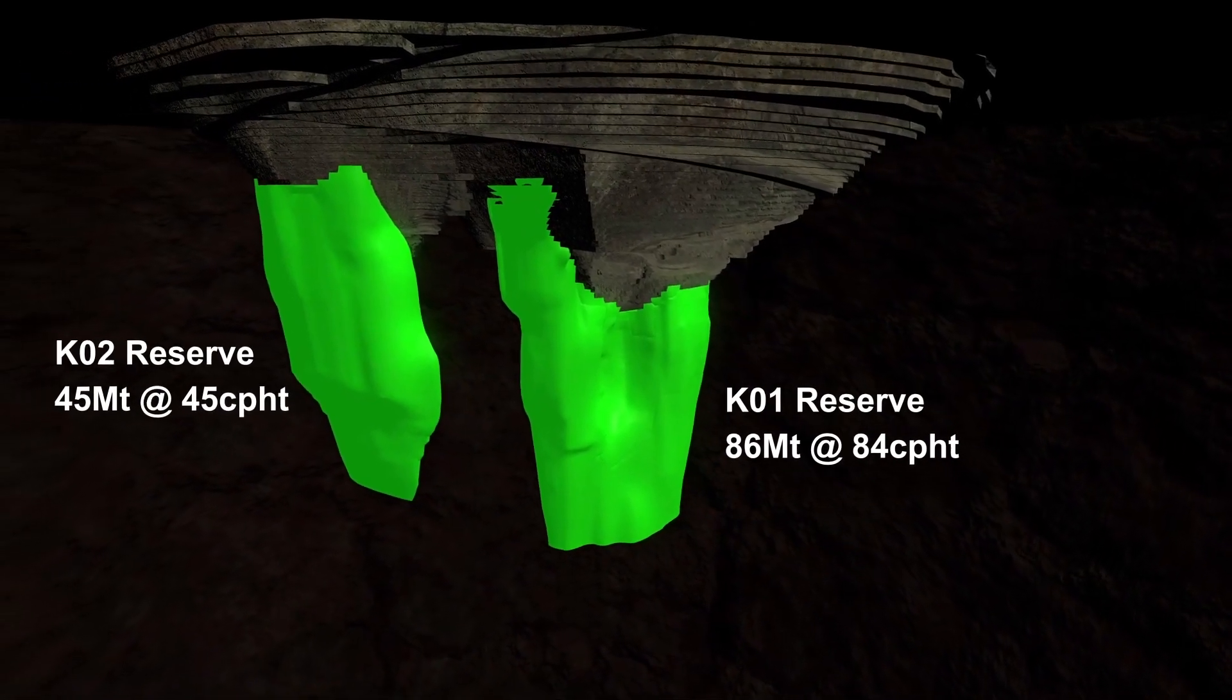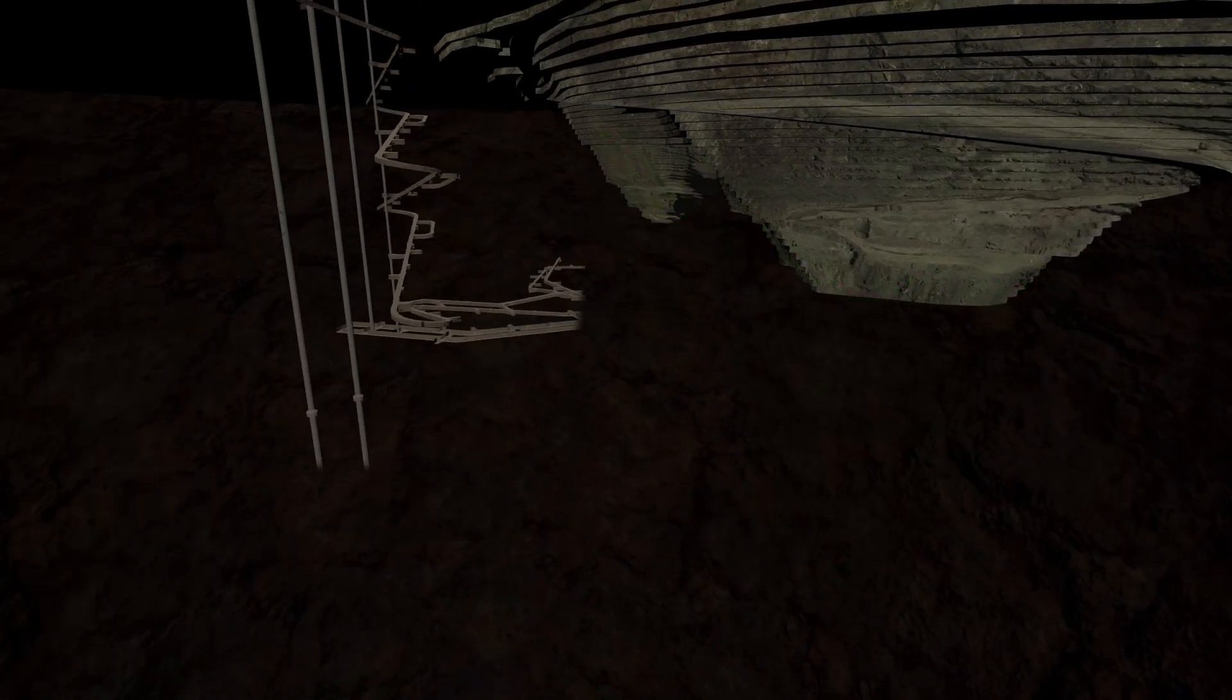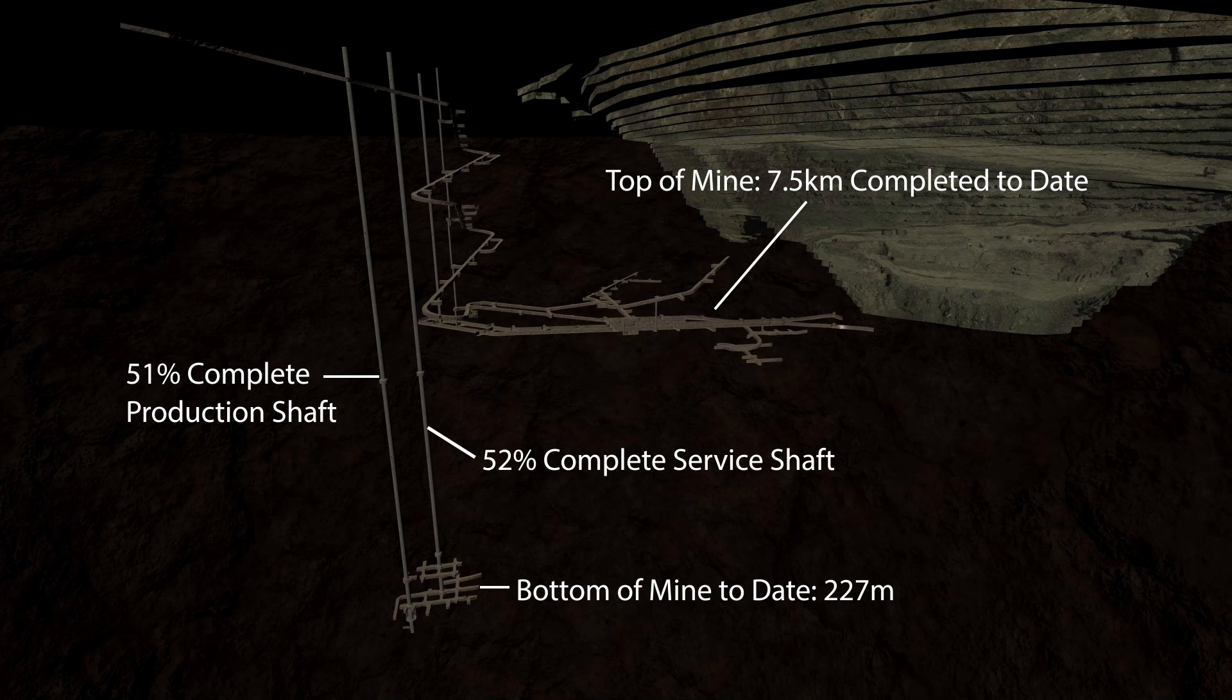At full production of 5.9 million tonnes per annum, an average of 3.5 to 5 million carats per annum will be yielded. The production shaft is currently undergoing equipping with the first stage commissioning due in 2022 and the service shaft will be commissioned in 2024.